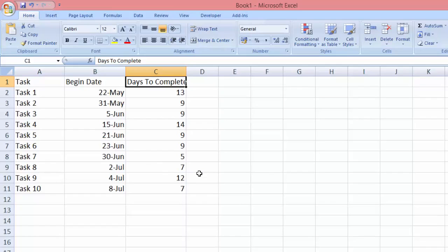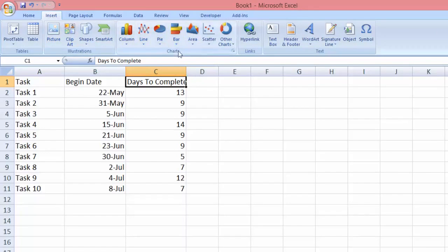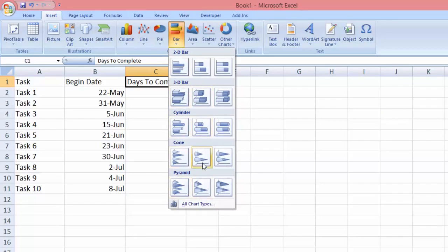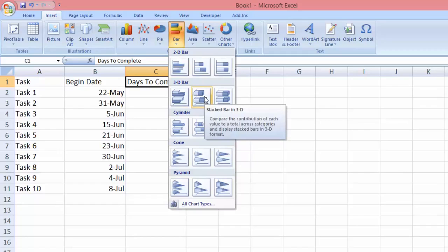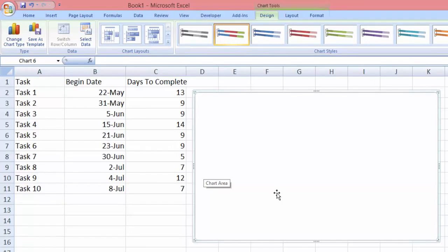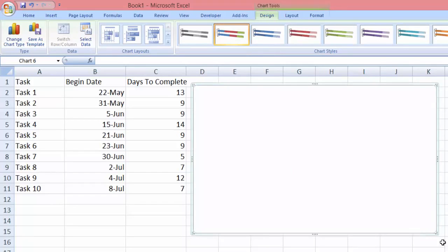Let's begin. To create a Gantt chart we need to go to the Insert tab over here, and here you will see these chart options. We are going to select the bar and there are several options that you can choose from, and I'm going to select the 3D stacked bar. Once you click, you will see this blank area appearing on the spreadsheet.